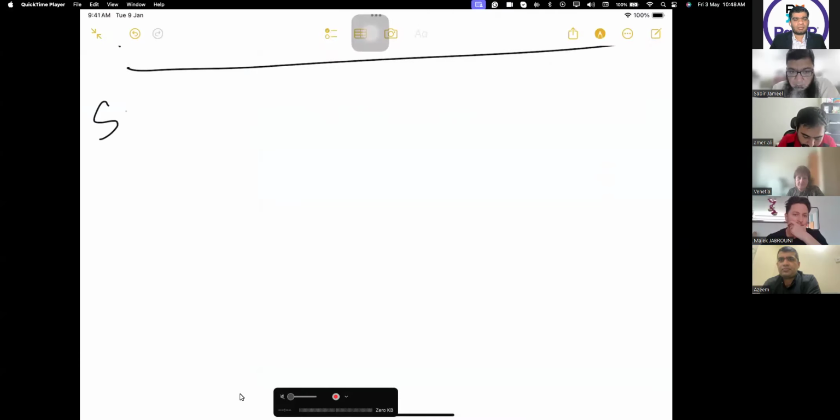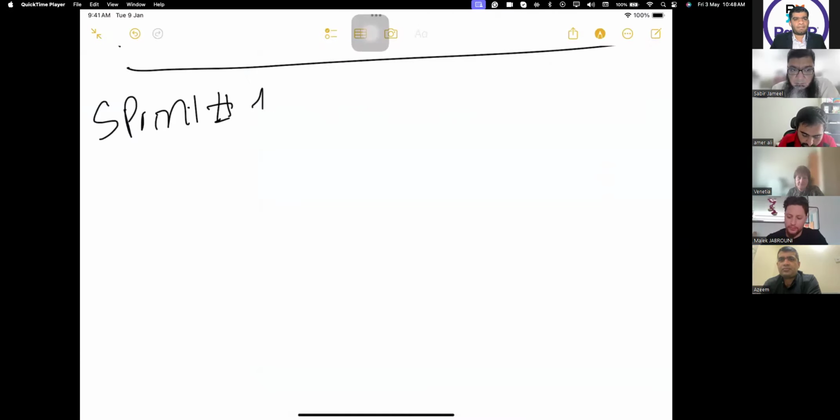Okay, let's discuss now. Your product backlog is ready. Now you are at the first sprint. What was the length of a sprint, Vanita? 2 weeks. It can be 1 to 4 weeks. In the start, the product owner will decide, okay, let's make it 2 weeks or 3 weeks, whatever it is. So we decide now the length of the sprint, and this will stay the same. So we are at sprint 1, and we decided it is 2 weeks.